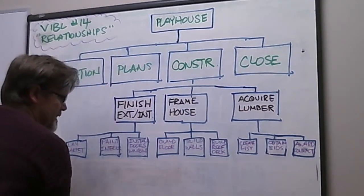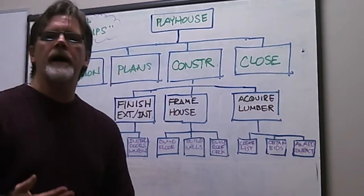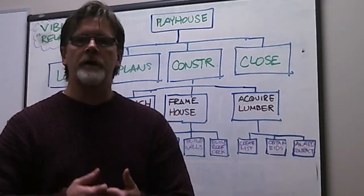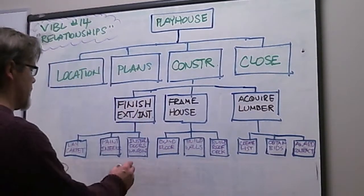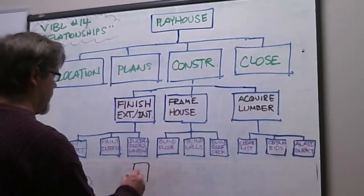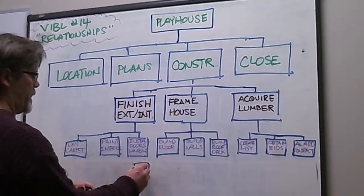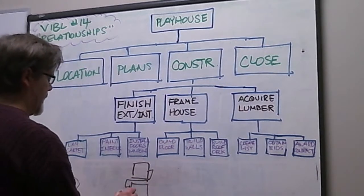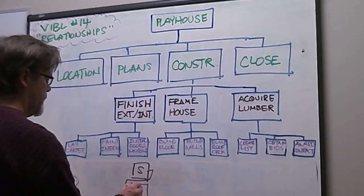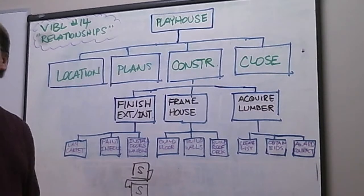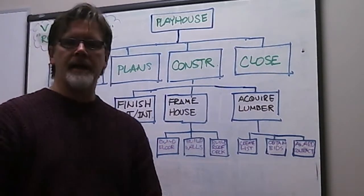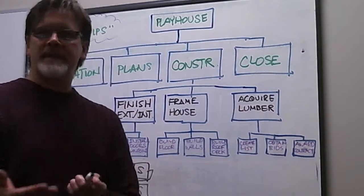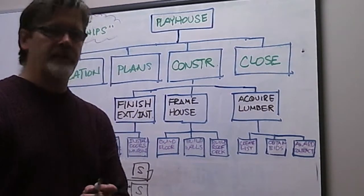So what is a soft logic relationship? One of the soft logic relationships used often is what we call a start-to-start relationship, and it would look something like this: we start an activity, and as this activity starts, we start a second activity at the same time. So it is a start-to-start relationship — a concurrent action of activities where once one activity starts, the other activity starts as well.